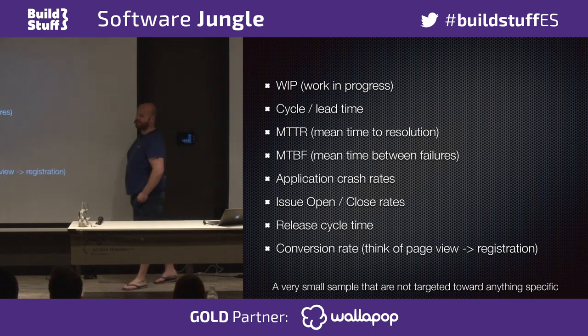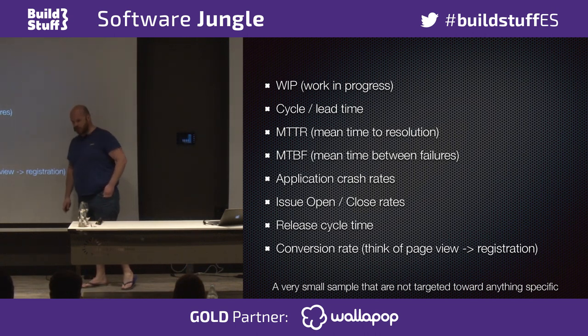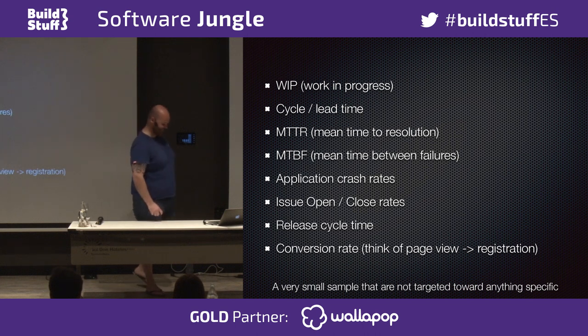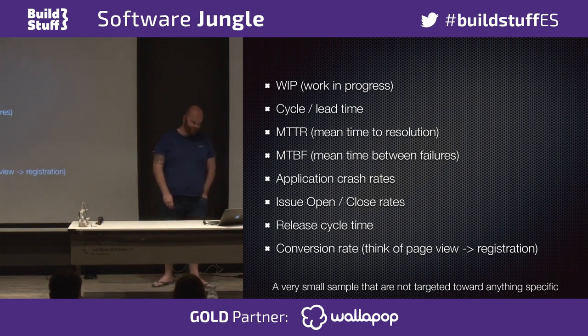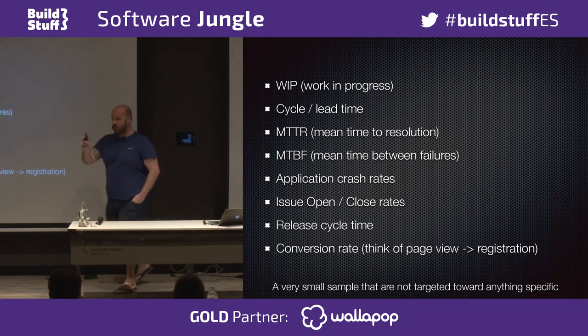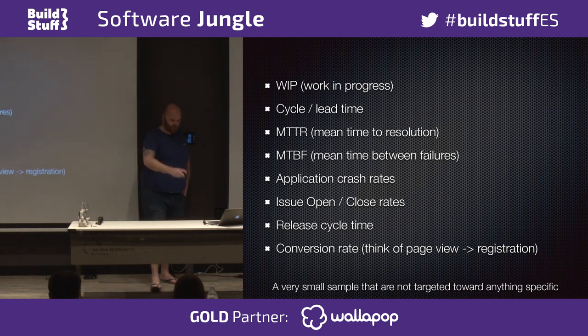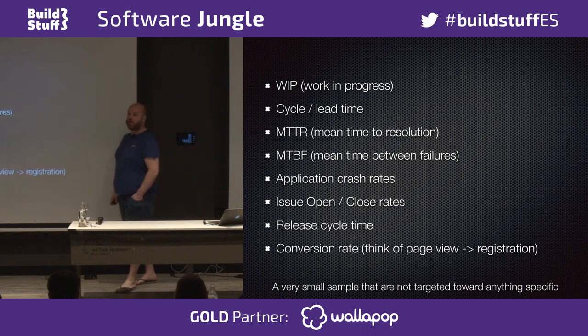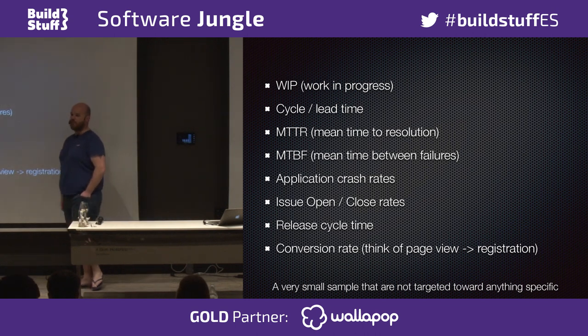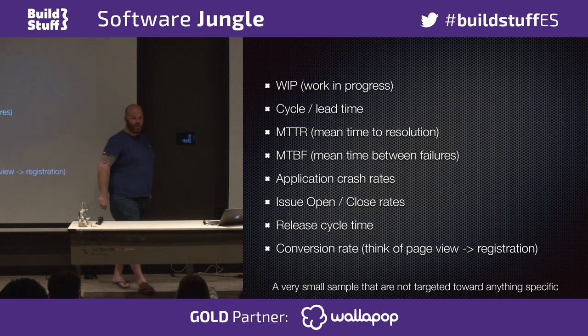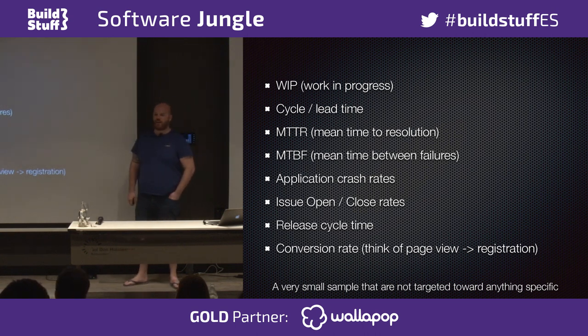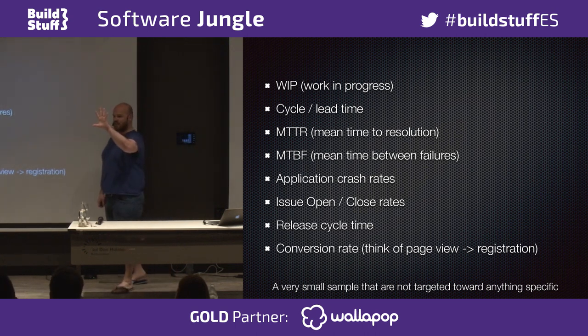Two more. Release cycle time. So the time taken in order to release. Now, I promise I'll only keep it for 2 more minutes. When I was at OpenTable, we used to have this scenario where we would work for 4 weeks at a time, okay? 4 week sprints. And then after the 4 weeks, there was a 5 week integration time. I'm not joking, 5 weeks.